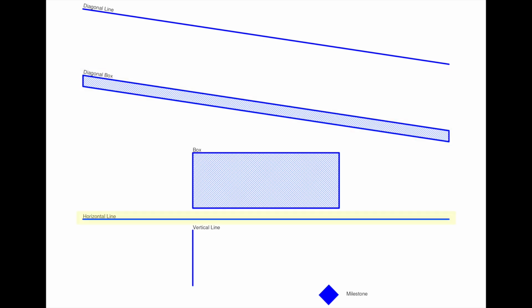Horizontal line. This represents a milestone or event covering a set chainage range. For example, it could be a key date for a section of works. Vertical line. This can represent an activity that has a small physical footprint, such as constructing a manhole, or it could represent a location milestone that is within a range of dates.